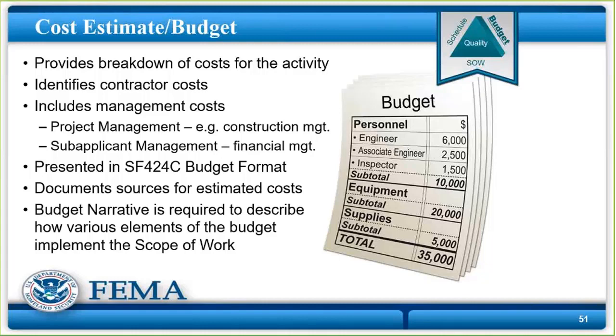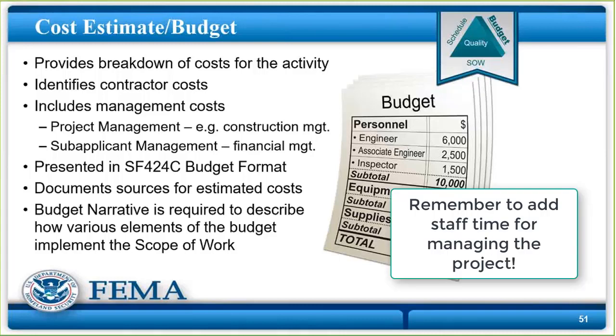So you need to identify the various costs. I'm mentioning here management costs. I think I've talked about this because this is a big boo-boo that a lot of people make. They forget to include the tribal staff time necessary to manage the project, okay? So those are eligible costs. Now, those costs may be your match, that's fine. But if they're not in the budget, you can't count them as match.